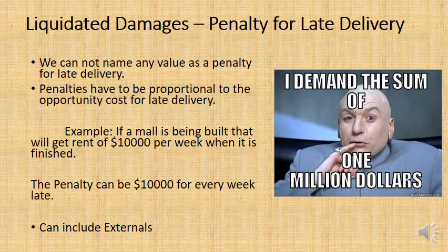You can't do that. That would be unfair. You need to make sure that the penalties that you're stipulating are proportional to the opportunity cost for late delivery. So let's talk about that.